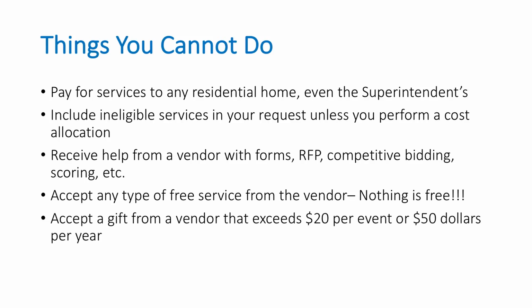You cannot receive help from any vendor with any of your forms, your RFP, your competitive bidding process and scoring, etc. They cannot be involved. Communication needs to be almost no communication, but there are times where clarifications need to be made with the provider. I would suggest that even if you respond to one provider, you respond to several of them, or you try to keep it very fact-oriented and try not to give one provider more information than another. You want to protect yourself in this process.